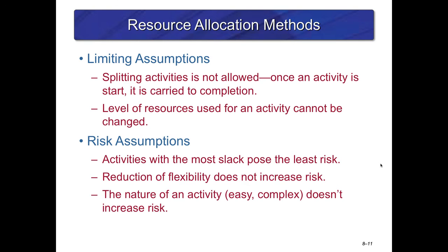Activities with the least slack pose the most risk. In other words, the ones that are on the critical path are the most risky. They're the most sensitive to change. So risk and sensitivity go together. I'll go back over that again when we're reviewing for the test. So on slide 811, activities with the most slack pose the least risk.